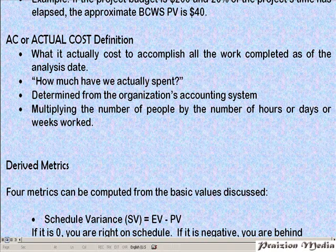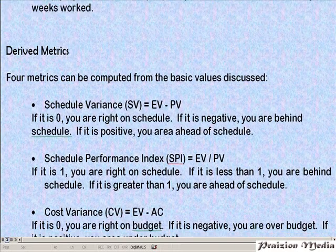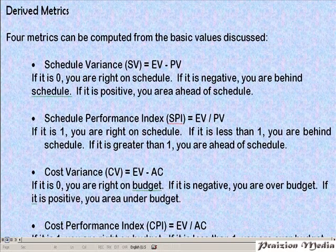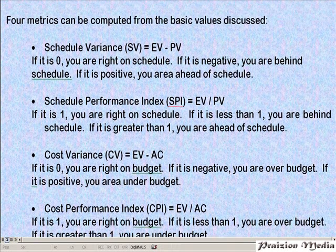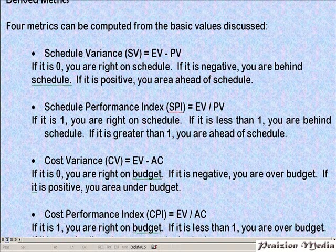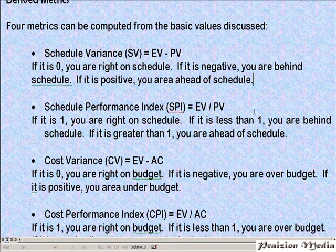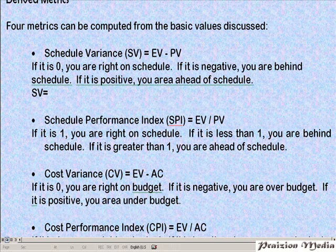Now let's talk about derived metrics. There are some derived metrics from those three basic Earned Value values, and these metrics can be computed in different ways. Let's first talk about Schedule Variance. Schedule Variance is the variance in schedule, and it can be computed using the formula: EV minus PV. Schedule Variance is a measure of how much you have deviated from your schedule. If Schedule Variance is negative, you are behind schedule; if it's positive, you're ahead of schedule. In our example, Earned Value is $10 and Planned Value is $20.